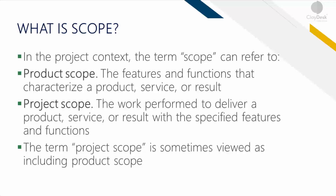In the project context, the term scope can refer to either product or project scope. Product scope means the features and functions that characterize a product, service, or result. Whereas project scope means the work performed to deliver a product, service, or result with the specified features and functions. The term project scope is sometimes viewed as including the product scope as well — just a subtle difference between the two.